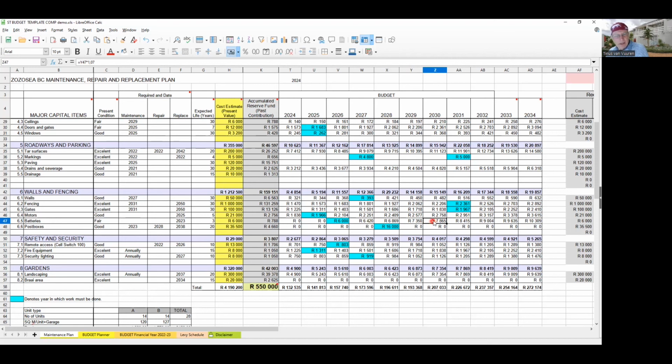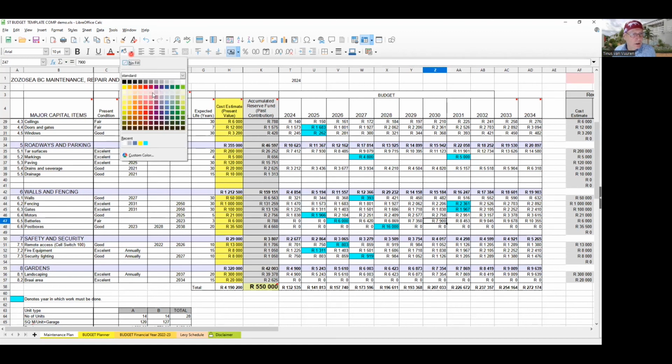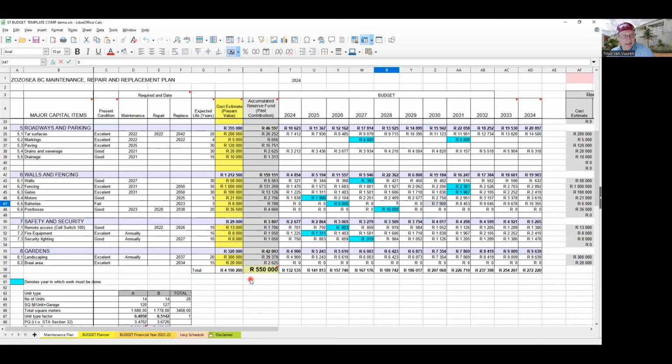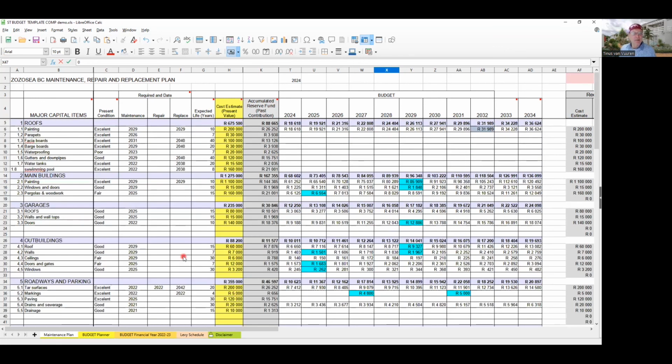By that time, it's going to cost you 7,900 to do. So you can put that one in there, make it 7,900. Enter, make that blue. And then I can make those 0, 0, 0. Okay, that's it. That's my 10-year maintenance plan.